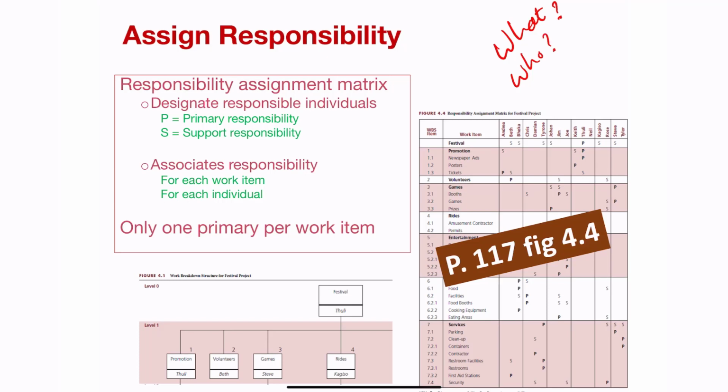So now that we've done the work breakdown structure and we've broken down every single activity into its smallest part, which is a work package, its smallest part being that Paul is going to write a proposal and it's going to take him 3 days. You've got a person that you can hold accountable, an activity that needs to be completed, and a time scale attached to it. That's the smallest part, and that activity is what we call a work package.